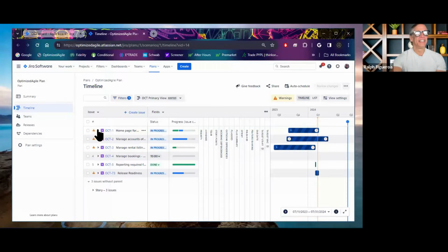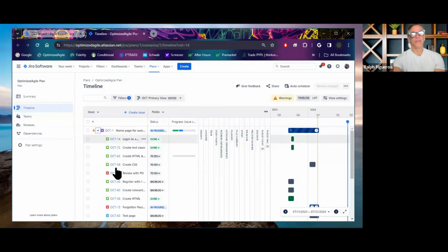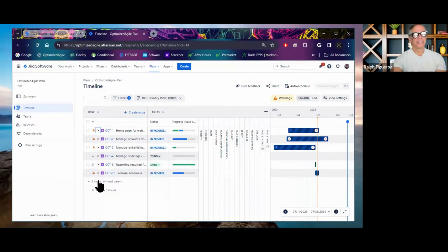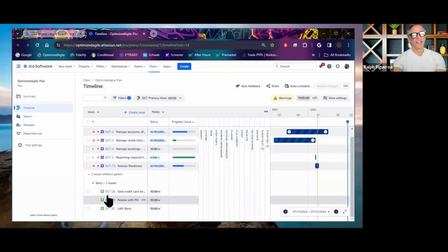So you have to create all that fixed version based on conversations you have with the team. And the team is disciplined enough to tag all the stories, bugs, tasks, everything else with the fixed version, so that when you apply the filter, you are getting the exact content of the work. And then also you get some orphans, being issues that are not bound to any epics.